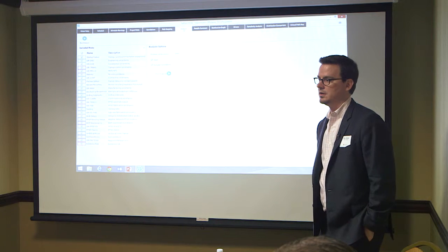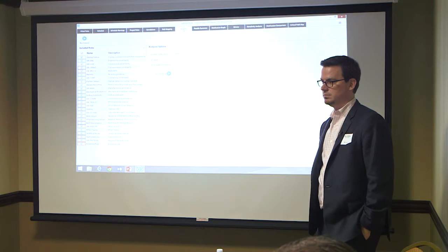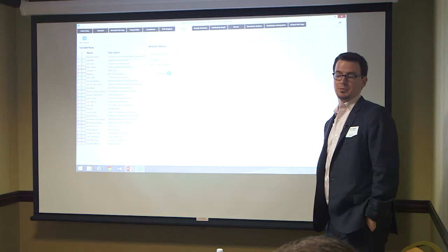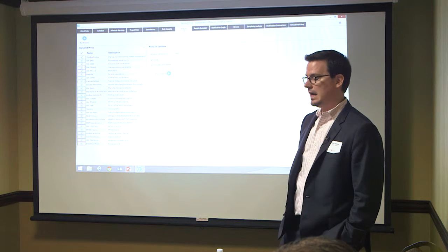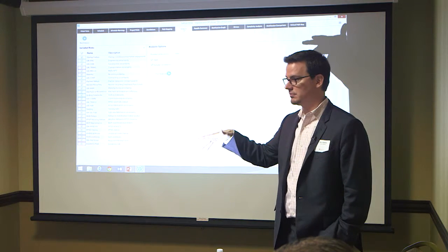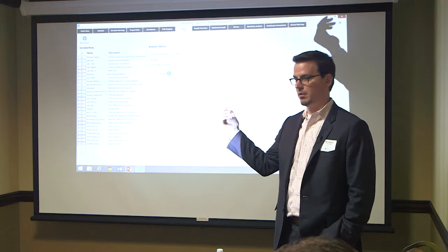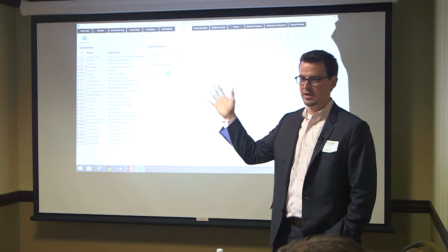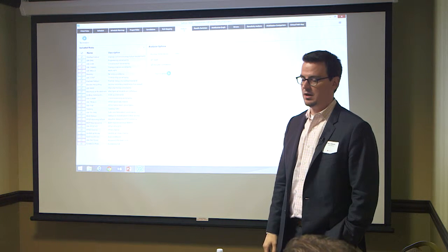How does it handle importing projects that have multiple calendars? Well, I won't say we're fully bulletproof, because no one ever is; you're always chasing the last update. To that point, going one level of detail lower is where you normally get around some of those issues. So normally if it's in days, I'll probably bring it in as hours and display it in days, because then I get around any of these overlapping calendar issues.